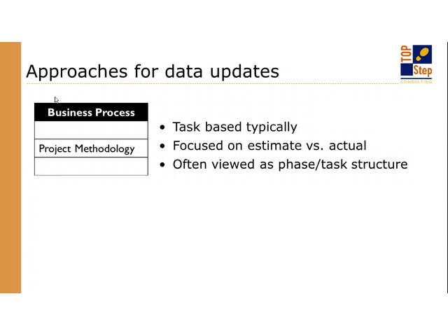I think there's a lot of opportunity lost out there in OpenAir's ability to say, okay, I estimated it to be 40 hours of planning, and we're coming in at 20, but now we find out that on the back end, the 16 hours of support have turned into 75 because maybe we didn't catch things early enough, because we didn't spend as much time as we should have. So those kinds of methodology reviews or metric checks or follow-ups.